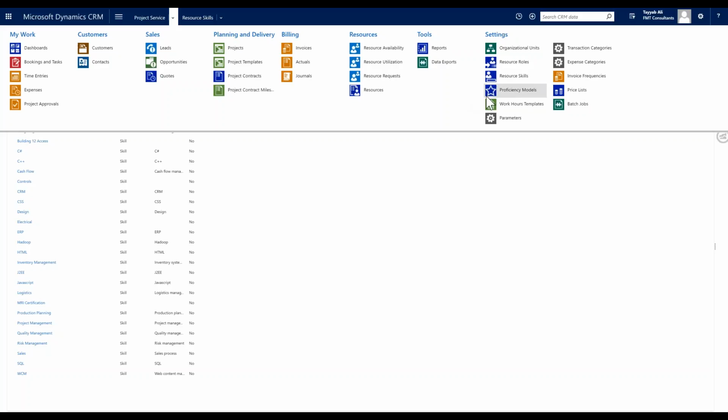We're also able to identify when people are actually going to be available, so that way you don't book them outside of their actual available work time. So if, for example, you have holiday schedules or nobody's working on weekends, you can set these things in place so that way you always know exactly how long they're going to be working on the project. So if it's an 80-hour cycle that you have somebody assigned to for a specific task, it's not going to accumulate those 80 hours outside of business operating hours.